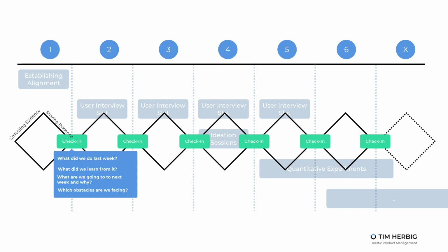So you want to schedule those discovery check-ins probably on a weekly or at least bi-weekly basis, getting together for 30 minutes, simply sharing the rough outline and the pieces of evidence you have collected during the last discovery sprint you worked through, and asking the questions you need in order to make decisions moving forward in case there's any uncertainty. Keeping all of that in mind should give you a pretty good starting point for setting up your individual product discovery structure and schedule.